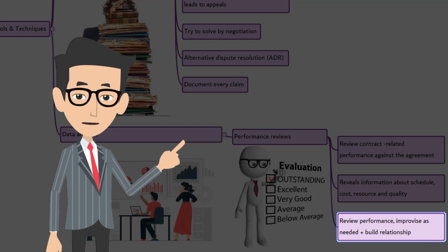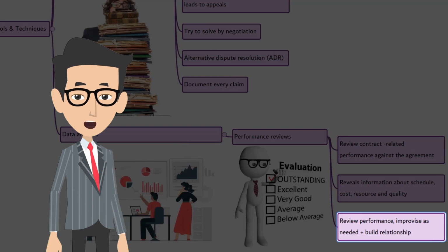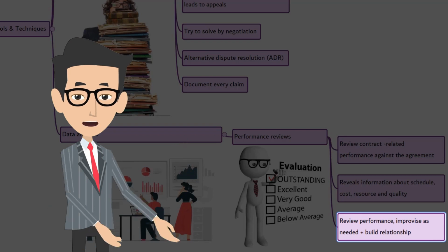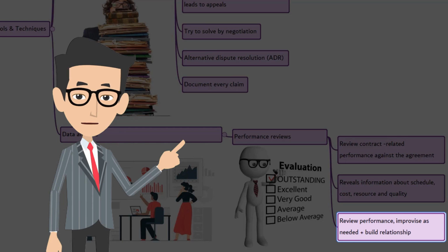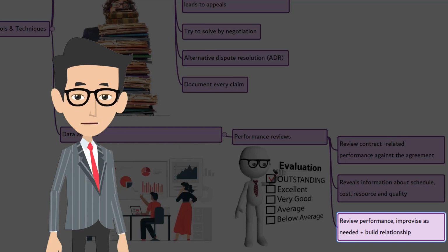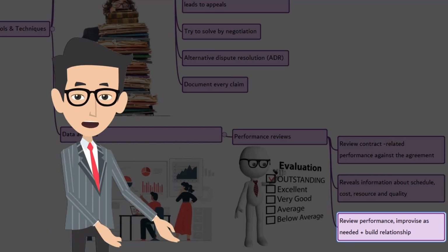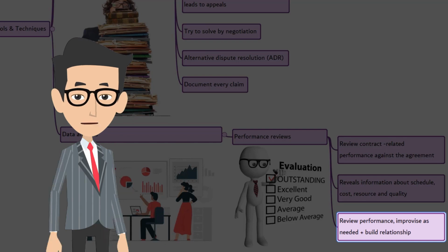During the review, the seller and buyer will discuss what can be done differently to advance the work. Formal changes to the management plan or the contract may be requested as a result of this meeting. This review also helps to improve the relationship between buyer and seller.